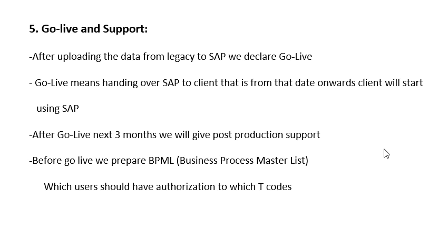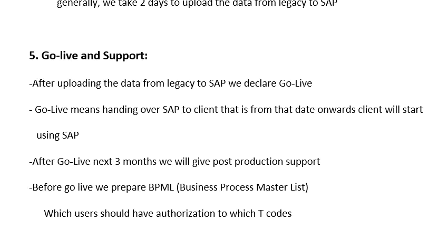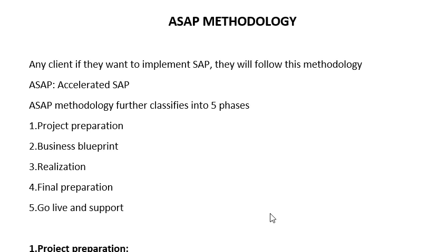Before go live, the consultant will prepare a BPML document. BPML means business process master list. It specifies which user should have authorization to which T-codes. After that, the basis consultant will give authorization to the users. So friends, this is about SAP methodology, which is the implementation methodology for an implementation project.